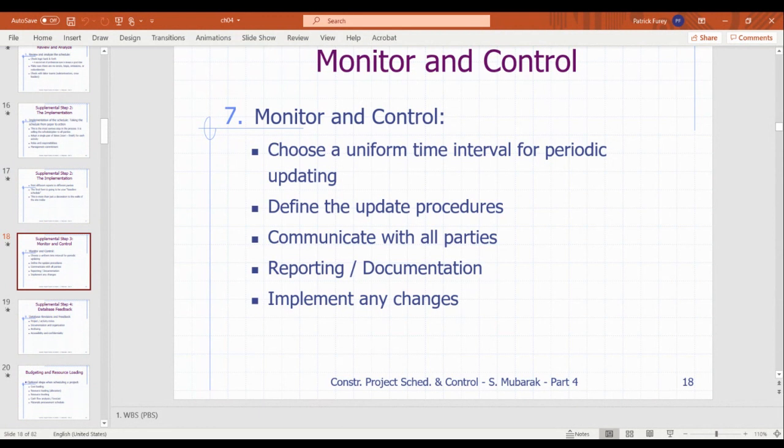That is the same thing as the drawings, the plans that the architect made. That's a contract document. It's going to live with the project for the duration of its life, and it's what you're measured against. You told me you're going to get it done in 45 days. Why now are you telling me it's going to be 60? That baseline establishes what you agreed to in the original contract. So you really want to be careful in putting together that first detailed schedule that you might see at a kickoff, because that becomes what you are measured against.